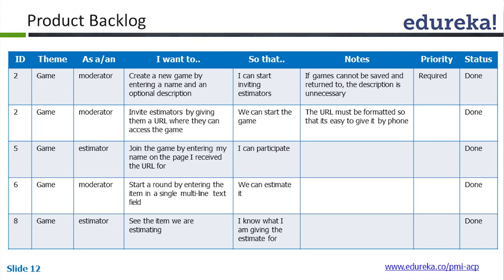Moving to the third column — 'as a' — using yesterday's example: as an HR manager, I should be able to do a search so that I can view the resumes. So 'as a' is the persona — here it's HR manager. 'I want to' is what you want to actually perform — I want to perform a search. 'So that' is why — so that I can view or download the resume. 'Notes' is for additional TAS or special notes — this is optional, you might have it or not.